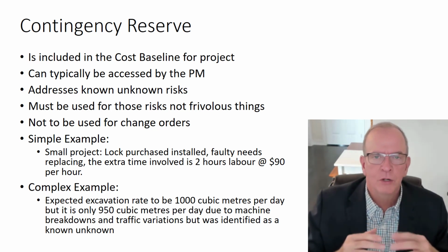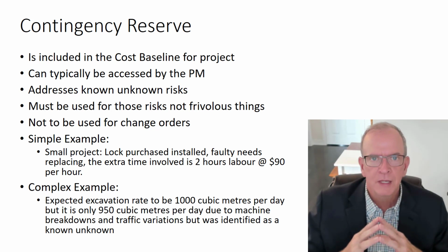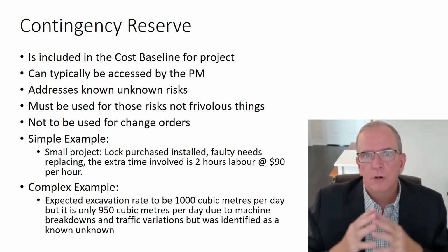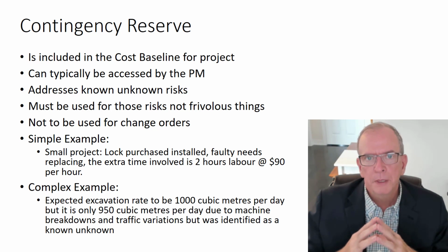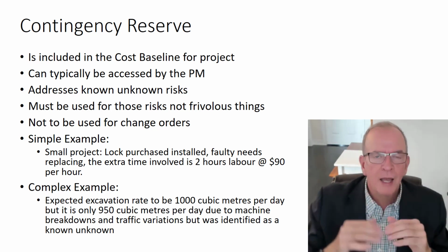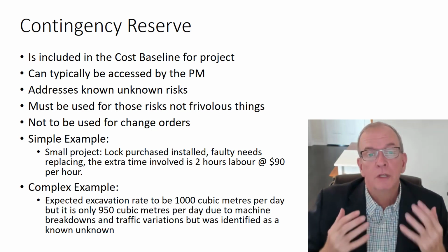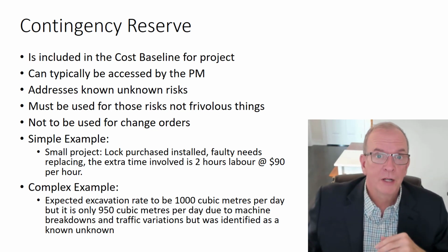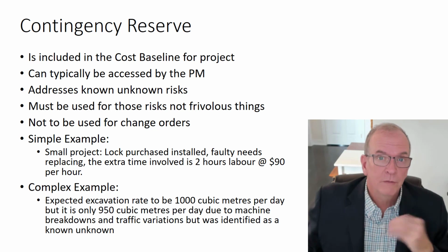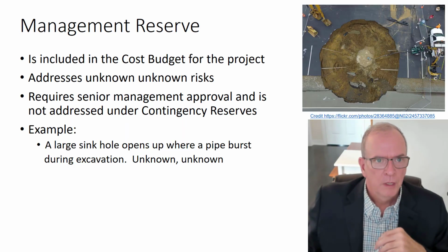You'd also look at your historical data on those types of things as well. And this is where keeping track of it as you go through your project, what gets utilized and what doesn't, helps to build up your understanding of risks and probabilities on your projects over time. So it gives you pretty good feedback on that. And because it's kept as separate items that can be drawn upon, you can document that, which means that you'll have really good data for future projects. And then you can get really detailed with it.